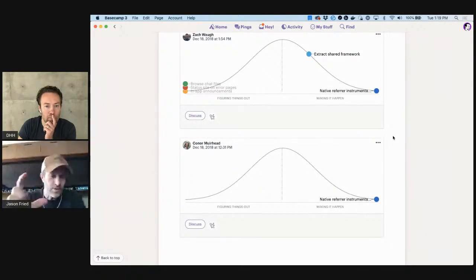Yeah, so that's actually a great point, which we can't really demonstrate here, but when we create to-dos in the beginning of a project, we're not creating the whole project yet. We don't know what work we're going to encounter specifically as we go. So the shaping doc is about the big picture, but as the project evolves, more and more work is added. This is not about starting on day one with everything specced out. We don't know what we're going to experience. So this is about a very fluid process, a very intuitive process. We discover as we go, and we make calls and cuts.